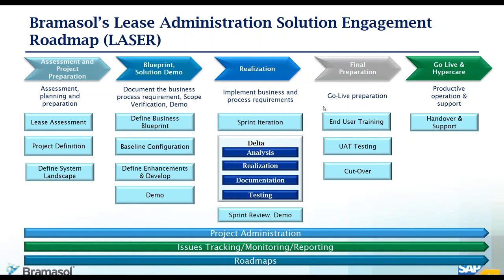That's one part. The second piece is accounting relevance and treatment. We will work with your audit partners and accounting teams to identify what the relevance and accounting treatments of those leases are. Then the third step is to configure for the new compliance standards, the FASB ASC 842 and IFRS 16 regulations. And finally, last but not least, we load the data into the system.